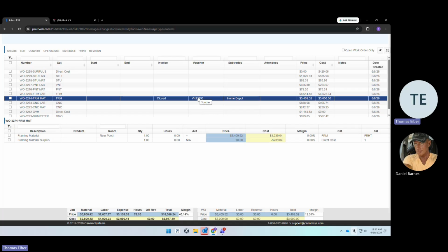So when you voucher this, it sends the system a message. It says, hey, this money needs to be paid to this vendor. When Jeffrey closes that current invoice in QuickBooks, even though you say that it's $3,000, Jeffrey understands the art of negotiation, and he has great purchasing power with many of our vendors, which means if you allocate $3,000 and Jeffrey gets your materials for $2,700, that is the purchasing power that we have here.